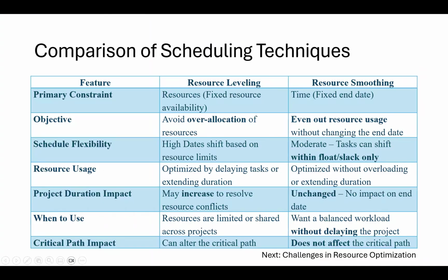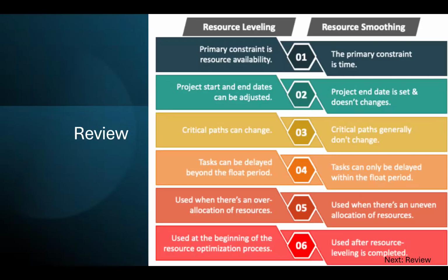Let's review it. The difference between resource leveling and resource smoothing. With resource leveling, the primary constraint is resource availability. Whereas resource smoothing, the time is essential. We cannot extend the stated end date. With resource leveling, start and end dates can be adjusted. With resource smoothing, they cannot.